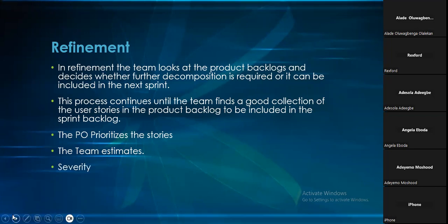Severity is like importance, like ranking. So how important is this? If they tell us to do 1, 2, 3, 4, we said we're picking 4 things into the increment. The PO can tell you that, please mute yourself. The PO can tell you that number 4 is the most important one. It can tell you that the next story that is important is number 2. The next story that is important is number 1. And so you put them in order of priority.